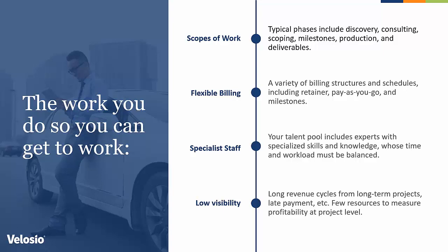Flexible billing. I don't think we've found two companies that do billing the same way in the years that we've been doing this. Everybody does it just a little bit differently. There are a variety of ways to do your billing, whether that's the retainer, the pay-as-you-go, the milestone, the percent complete. If you're in the construction or engineering or architectural business in the U.S., it's the AIA billing. Flexible billing is a big deal. Giving software the flexibility to do things the way you need to do it tends to be a big deal, so we want to make sure that we keep on track with that.